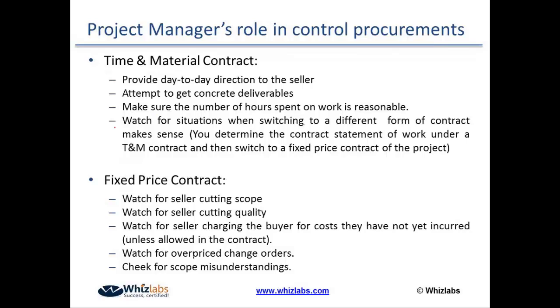Coming to this time and material contract, the project manager needs to provide day-to-day direction to the seller to ensure that the project is going through valid deliverables. Attempt to get concrete deliverables. Do not simply give up the work to the supplier or to the vendor. Rather, take some control of the project scope. Set some concrete deliverables, set some predefined target dates for achieving them, so that you have some control on the work being done.